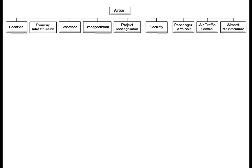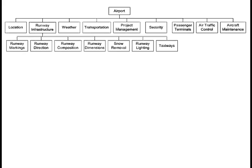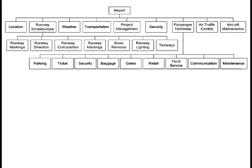Now we have some major pieces of the airport, but we're still at a level that is too high to comprehend and manage the activities necessary to achieve the goal. Each of these would need to go to the next level of detail. For example, if you broke down runway infrastructure, you'd have things like runway markings, runway directions, material composition, dimensions, snow removal, runway lighting, and taxiways.